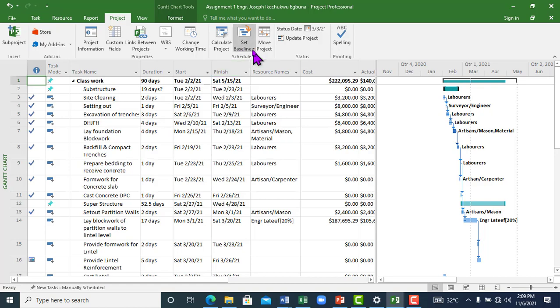Alright. So basically what this does is, the ideal thing is when you are planning for a project, you decide the initial schedule. When you get approval for that schedule, you will save it based on the information that you have entered. It's like a snapshot in terms of activities, in terms of duration, in terms of costs where you are. Now, most projects, during the course of the project, things change.